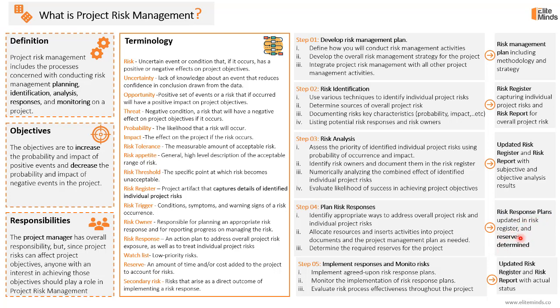The last step is implementing the responses identified in the previous step while simultaneously monitoring risks on the project. This includes implementing agreed-upon risk response plans, monitoring their implementation, and evaluating risk process effectiveness through risk audits and risk reviews. The outcome is an updated risk register and risk report with the actual status of risks on the project. That is project risk management in a nutshell. Visit our blog to learn more about risk management at the project, program, or portfolio level.